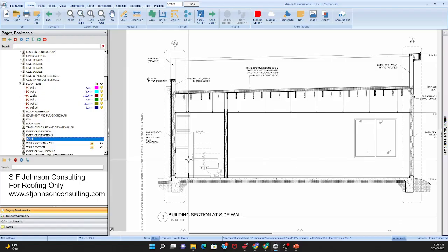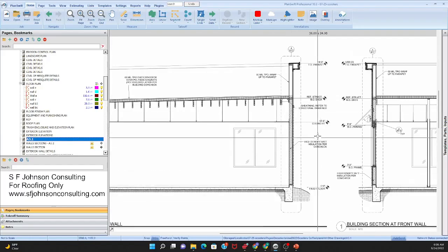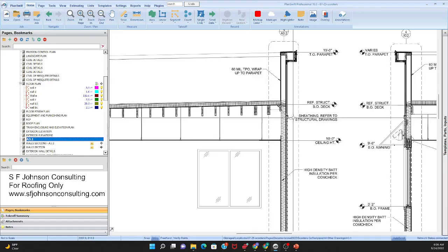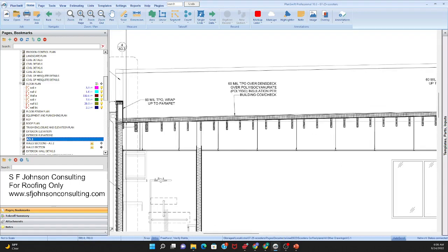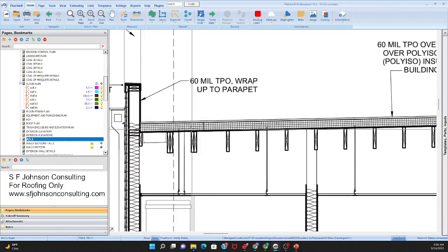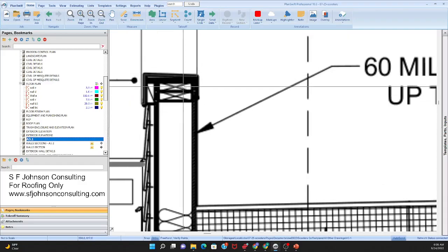It's good for the framer if we need to know the full height of the shear walls. Shear wall height usually goes the full height of the building, so now I know the shear walls are going to be this height. I can use it for the thickness of the insulation, and I can use it for finished carpentry. This looks like two top plates and another, most probably at the perimeter of the building.